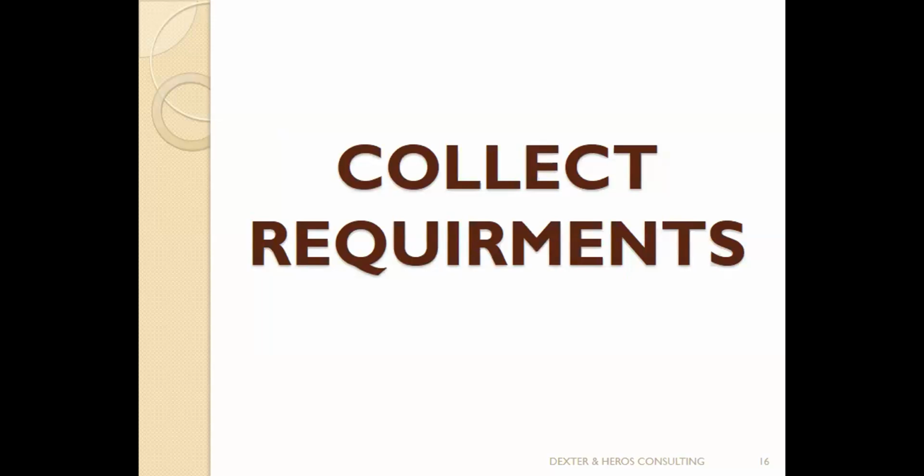Go meet the sponsor and clarify: sir, ma, how exactly do you want the result of the project to be? What and what should it include? What are the specifications that you want us to include? When you are trying to gather this, we say you are collecting requirements. Without this, you cannot do anything in the plan. Every project planning begins with you harvesting the need of the project owner.